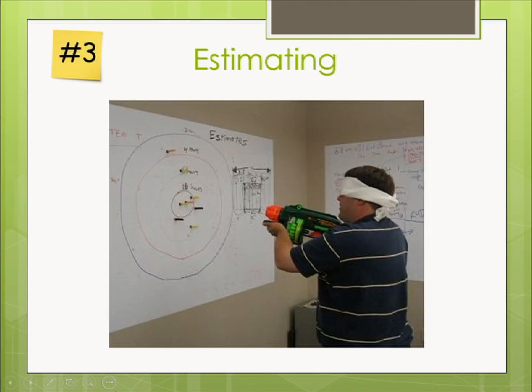Well, there's a lot of practical tips, like break things into smaller tickets. Ideally, we don't like our tickets to be more than 2 days of development. Sometimes they're more than that. There's no hard and fast rule. But when it's smaller, it's much easier to understand. If it's a big ticket, it's like, oh, well, I got to do this, this, this, and this. And then there's always a couple things that you don't think of.